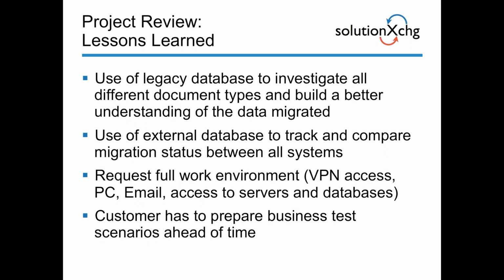We, in the future, are going to use external databases to track and compare migration status between all systems, especially if you have multiple systems in place. You have to understand that the data is partially in SAP, it's partially in your legacy system or systems if you're consolidating, and the resulting data is all in your new target system.